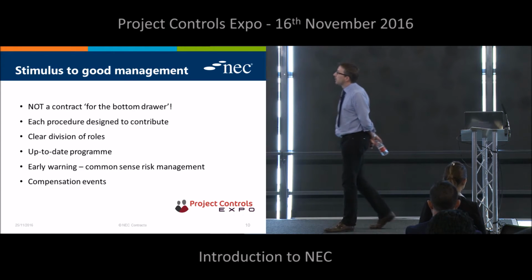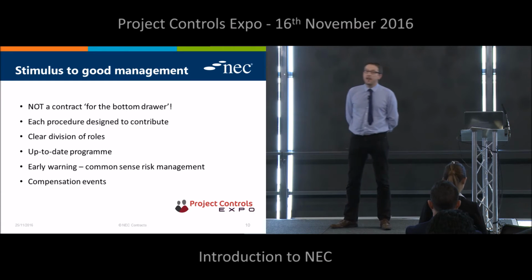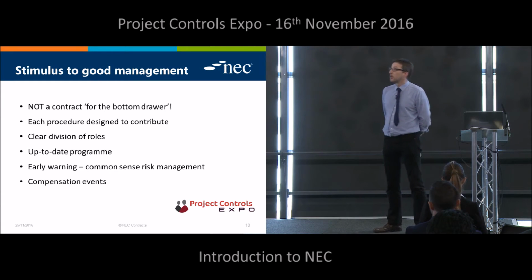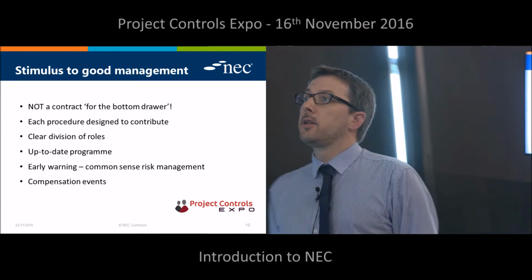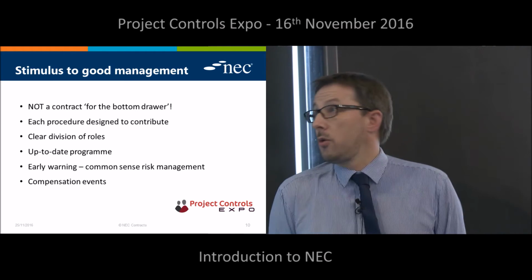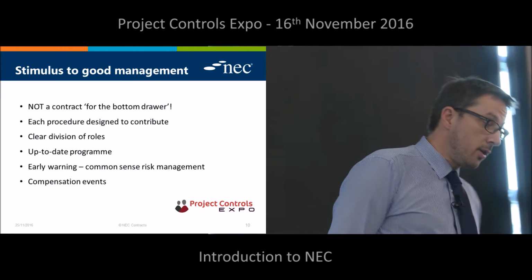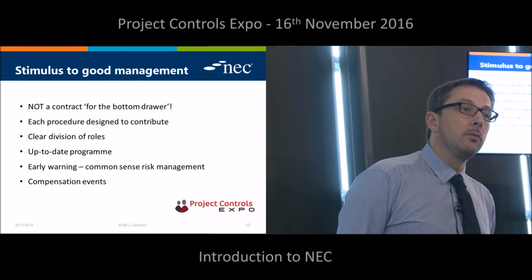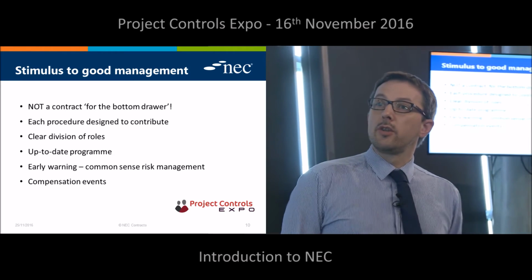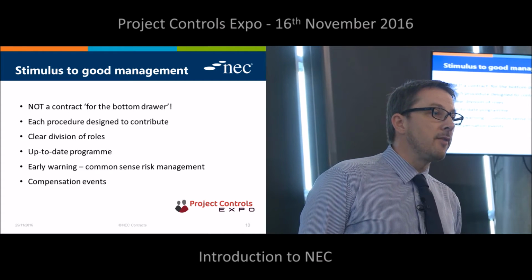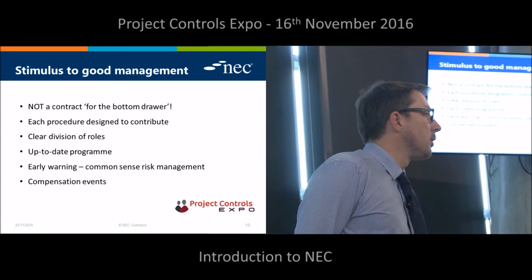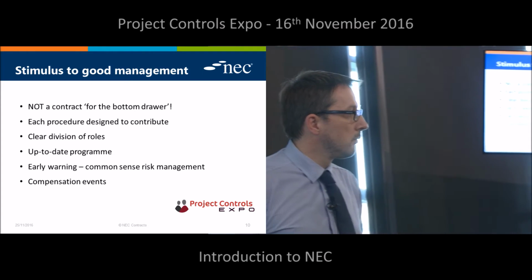Compensation events, that's NEC language for change management or a variation. And similar to other aspects of the contract and early warnings, there is a clear step-by-step process that you go through in order to evaluate a compensation event and agree the effect of the change from a time and cost point of view.